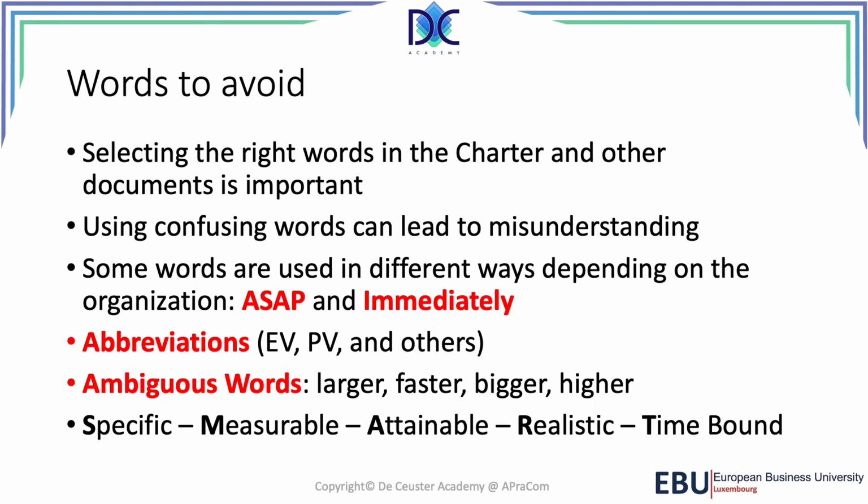So basically that's the thing, you have to be careful, because if you do something and you change deadlines without contacting the other people, you have to see what you are doing. So I avoid ASAP and immediately in a charter. I don't put it there. Put a date, it's very clear, you can discuss the dates.